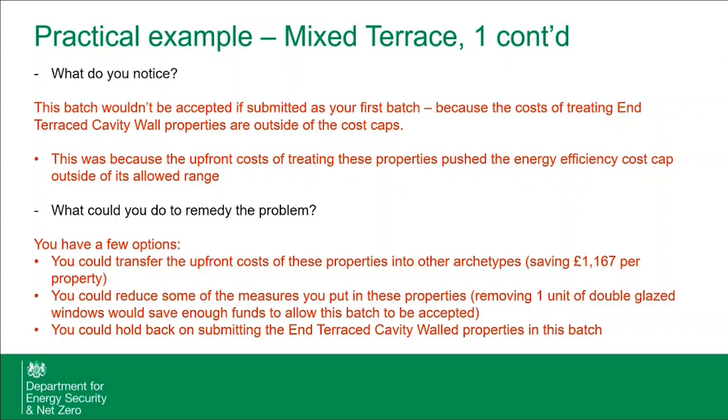We have the ability for you to draw down additional A&A through the change request process. So yeah, we wouldn't expect those upfront costs to be capitalised, and they won't have been logged through the batch system, so they won't have been recorded as money that's been paid out. So if we'd resubmitted the batch, we would take out the upfront costs for the properties that we'd removed as well. That's what you're saying.